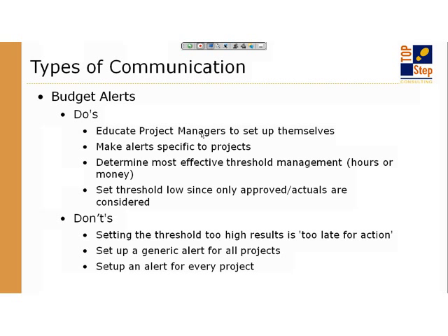Because as people are working on the projects, you want sort of an alert that, okay, people have an in-progress or open timesheet. Time is getting spent against the hours that I have allocated, and I'm really concerned that I'm going to lose out. You don't want to wait until the timesheet's been sent to you and then you approve the timesheet and then the system tells you, oh, by the way, you're over budget, because you're monitoring it. So for the budget alert to be really effective, what I recommend to people is set the threshold of when you should get an alert much lower than you would normally send it, because since it's dealing with actuals, you'll know that you have actually burned half of the project. That should give you an indication of are you on track or not.